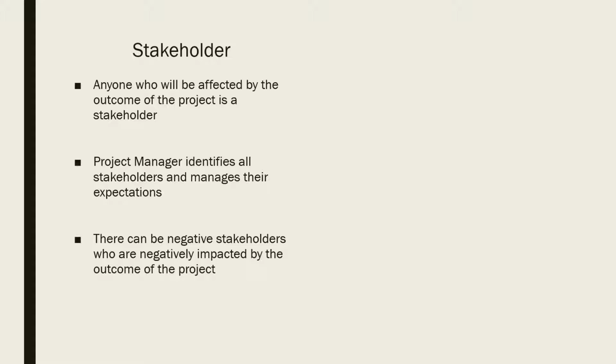So you need to manage the stakeholders, not just the positive ones, but the negative stakeholders as well. So if your project is to construct a commercial building in a residential area and the residents of that area are not really happy with your project, well, of course, they are the negative stakeholders, and you need to make sure how you turn them into your positive stakeholders. So that's the responsibility of the project manager. Like I said, not all stakeholders are rooting for the success of the project. There could be negative stakeholders as well, and as a project manager you should be able to deal with the negative stakeholders also. Now, let's talk about sponsor and what is the difference between a stakeholder and a sponsor.